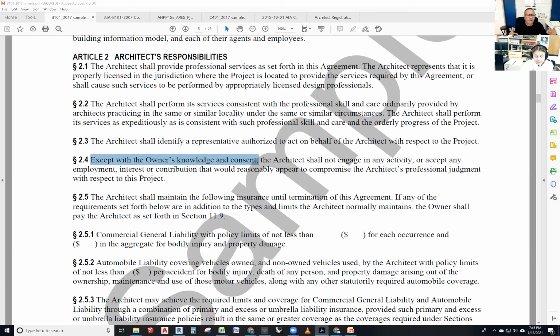Now, when would that be a problem? Well, if you tell that contractor directly by email, not by an addendum, which is issued to the public. It's a public thing to all the bidders that have expressed their desire to be involved in the project or have already been involved in the bidding process. If you just reply to that contractor and say, yeah, that's an acceptable change, go for it, you have already compromised your judgment, and you have also messed up the democratic process of bidding, because you have favorites. You can't have favorites during construction.